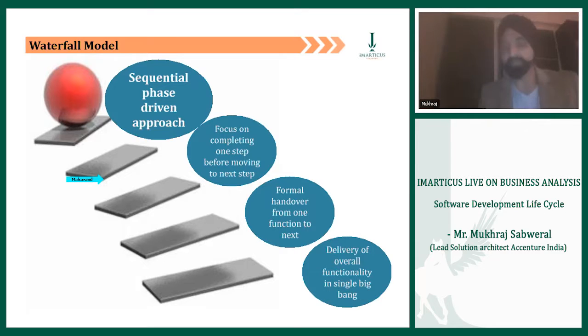While it used to do a good job, guys, there used to be some big problems coming up. If Rajesh gave us wrong requirements for some reason at the beginning, we waited till all requirements came in, and then we started writing designs for it. Then we started developing them as code. So we carried that incorrectness with us all along the way. That was a big risk, for which we realized that waterfall was not the most efficient project methodology. Besides that, it was not fast enough. And today, Vodafone and Airtel are demanding very fast time to market. What do I do? I have to shift to agile, right? So then we decided to give waterfall a little break.